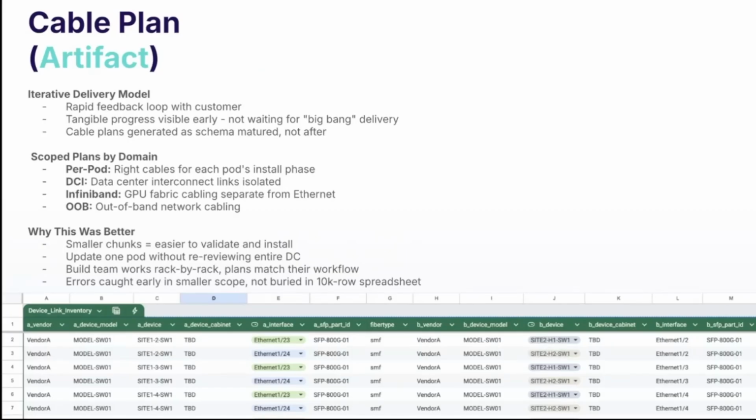After the generator was run, we have all our objects: our devices, our interfaces, and our cables, with everything. And one thing that we learned early was that building the artifact as you start is always a good thing. We were able to show the customer progress and ask, is this correct? Is this not correct? And solve some of the data issues. Did we not interpret the design appropriately and all that? That was a really big help throughout this whole project.